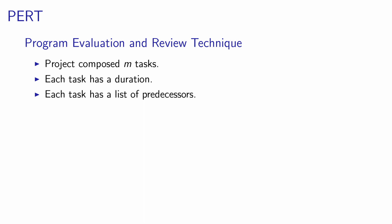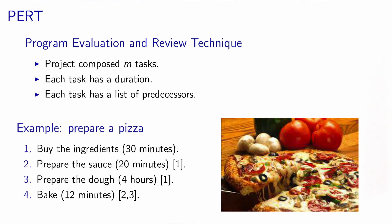We consider a project involving m tasks to be performed. Each task has a duration and a list of predecessors. For example, in a project to prepare a pizza, we have four tasks: buying the ingredients (30 minutes), preparing the sauce (20 minutes), preparing the dough (4 hours), and baking the pizza (12 minutes).